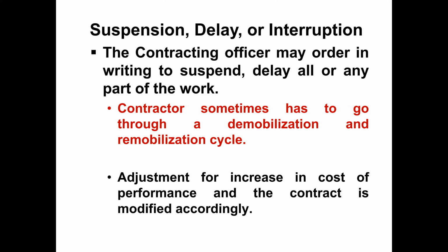Okay? But if this happens, and the contractors have to go through demobilization and remobilization, then they have to make this adjustment for increase in cost. How much was the standby cost, when their equipment was on site but they were not allowed to work?